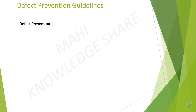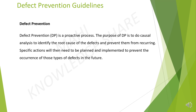Defect prevention is a proactive process. The purpose of defect prevention is to do causal analysis to identify the root cause of the defects and prevent them from recurring. Specific actions will then need to be planned and implemented to prevent the occurrence of those types of defects in the future. The defects may have been identified on other projects as well as in earlier stages or tasks of the current project. Defect prevention activities are also one mechanism for spreading lessons learned across projects.